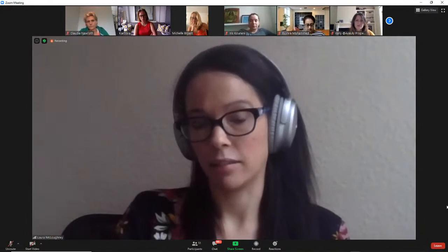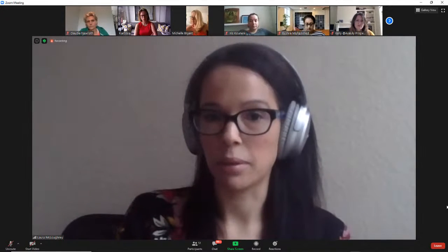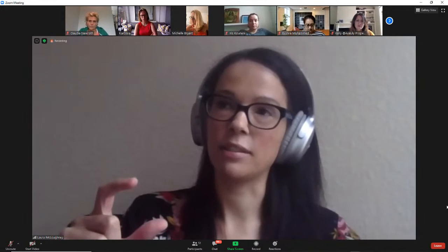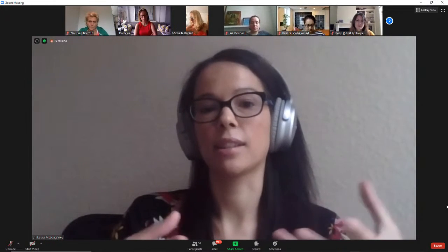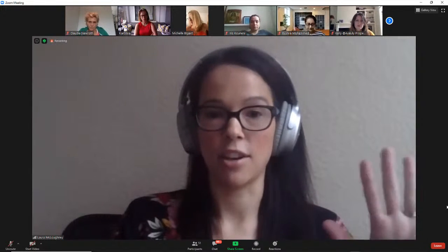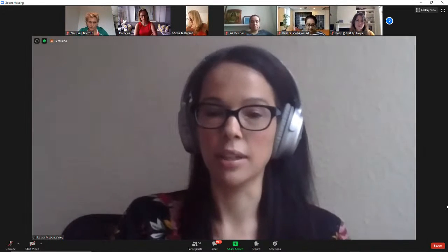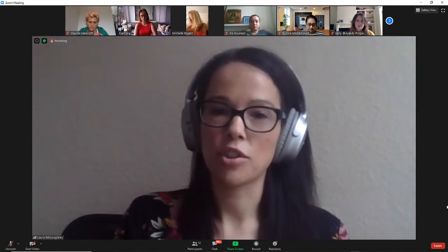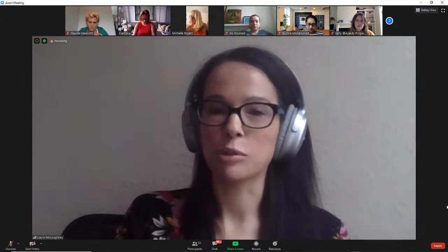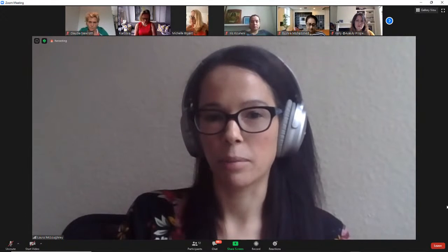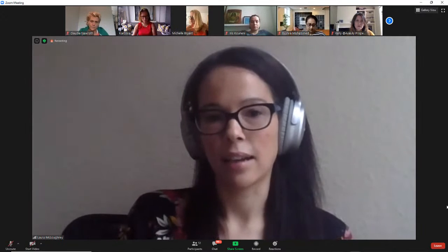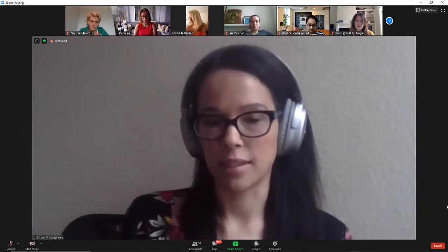but like Claudia said, be very careful with the additional complexity and have that space for, okay, listen, if this is a big issue right now, it's going to take an additional amount of time, or it's outside the scope that you've agreed to work upon, you need to have a framework to either say no or get paid for your extra time. So I think some people will do it as a percentage of build costs or a percentage of professional fees. And that's when the multiples get quite expensive, I think, for people to accept that cost for project managers. So it's a bit of a balancing act depending on how much scope there is in a project.